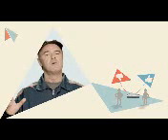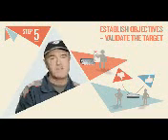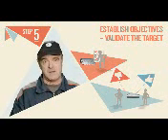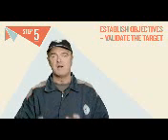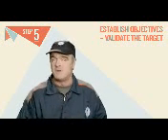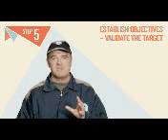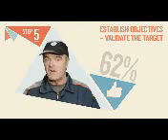So let's do a quick recap. In steps 3 and 4, you saw what is supposed to happen and compared it to what is actually happening. You identified the phenomenon. Well, now you can go back and check the original target, which was set by the WCM pillar. Is it still achievable in the light of this phenomenon? Well, in this case, the team and the pillar decided it was fine, so a 62% recovery rate became the formal target for the project. In step 6, the Kaizen team creates a realistic time plan for the remaining steps and agrees it with the WCM pillar. Now you have your phenomenon statement.